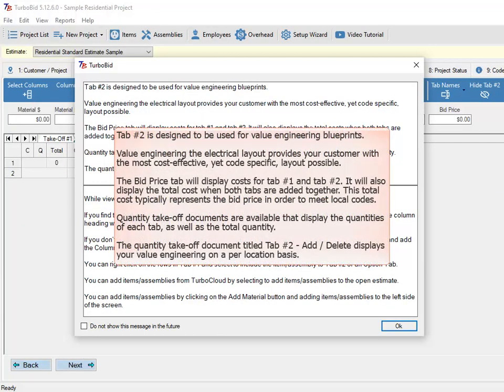Tab number 2 is designed to be used for value engineering blueprints. Value engineering the electrical layout provides your customer with the most cost-effective, yet code-specific, layout possible. The Bid Price tab will display costs for tab number 1 and tab number 2, and will also display the total cost when both tabs are added together. This total cost typically represents the bid price in order to meet local codes. Quantity Takeoff documents are available that display the quantities of each tab, as well as the total quantity.